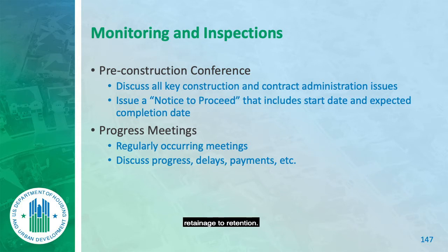Retainage or retention. I remember once I had a 300-unit complex that was done, and they had to put a fence up all the way around it to protect the safety and welfare of the public. Everything was going to be rehabilitated. Another time, everything was going to be demolished. That fence going up cost them $20,000, $30,000. I can pay them for the fence because I have the fence there. And if they walk off the job tomorrow, I have paid for the fence, so I simply call the provider of the fence and say, leave the fence, I'm taking it over.